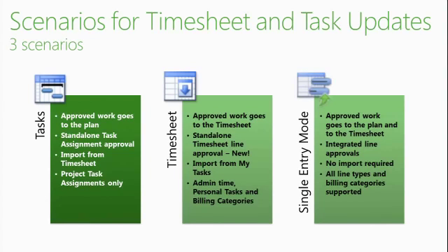And then the same process happens. The project manager has to open the plan or review the updates, approve or reject them, do something with them, apply the updates to the project plan, save, publish, to be able to push the data to the reporting database and the published database so that people can see them in PWA. All right, so this is how it's supposed to work.